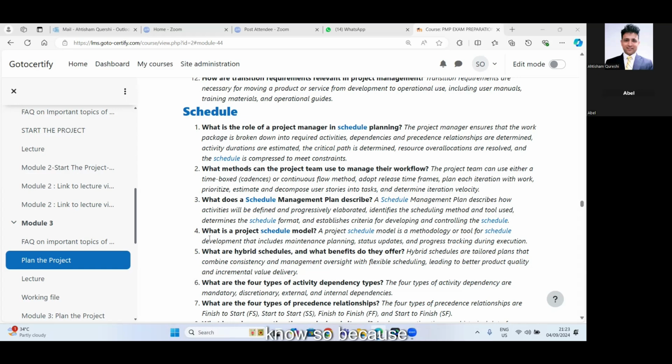Because an experienced resource will get the job done faster. On the other hand, a junior resource will take more time. But if we look at the experienced resource, it will cost us more, and a junior resource will cost us less. So there is always a trade-off: you will try to save time, but you will incur more cost. Makes sense, right? Now, when we identify various activities needed to be done in a project, these activities might have dependencies on each other.